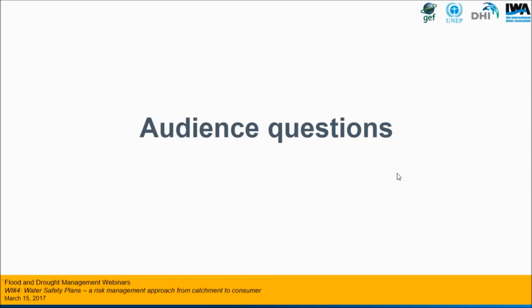Thank you. Excellent. And another question for you, George, specifically. Do you use water safety planning as a tool to prioritize and justify investments? And how does that work within your organization, if you work that way? Yes, actually that's the way we are doing it. For example, if there were upgrade plans in a treatment plant, I put what is required in the procurement plan and subsequently the budget and in my work plan.